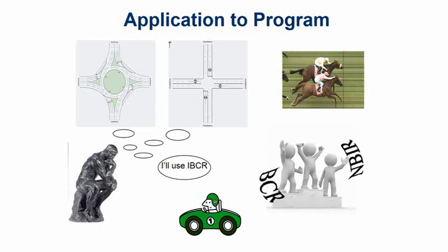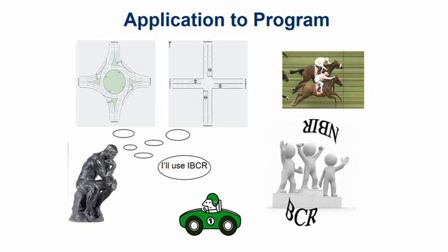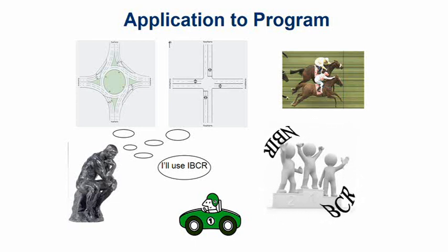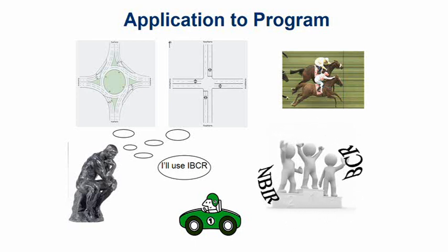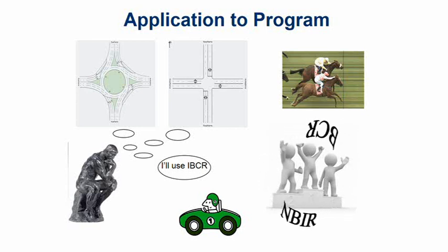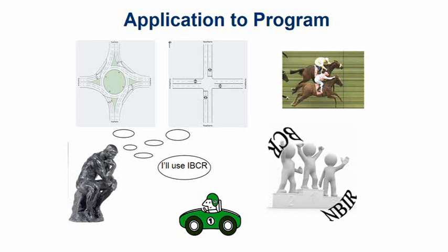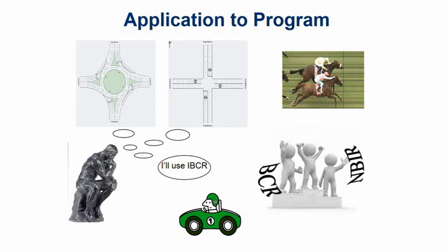I also like to mention here that we looked at the net benefit investment ratio. And that's something that I'm quite fond of because that's focusing on your returns for capital expense. That is your net benefits, taking out the cost side of it as well, and just focusing on that initial expenditure rather than comparing your benefits and comparing your costs over the life of the project. Because your investment decision is being made now with the money that is currently available. So I always thought that that was a very useful tool.